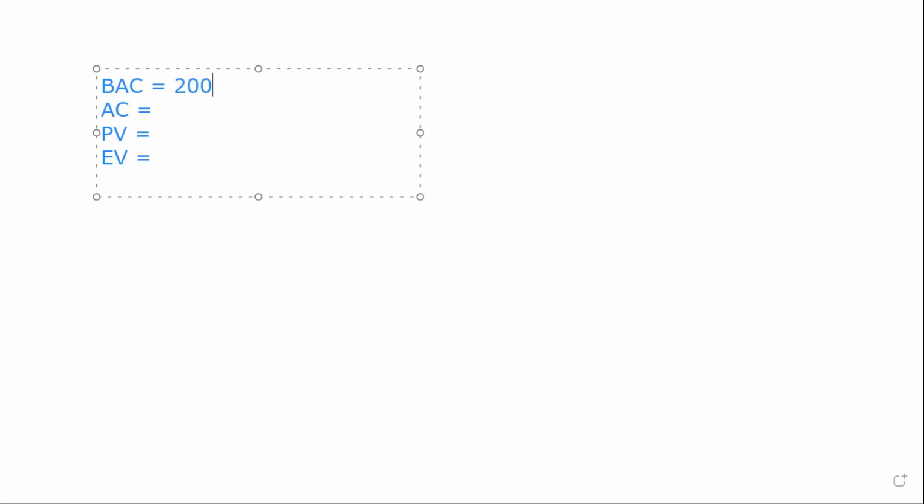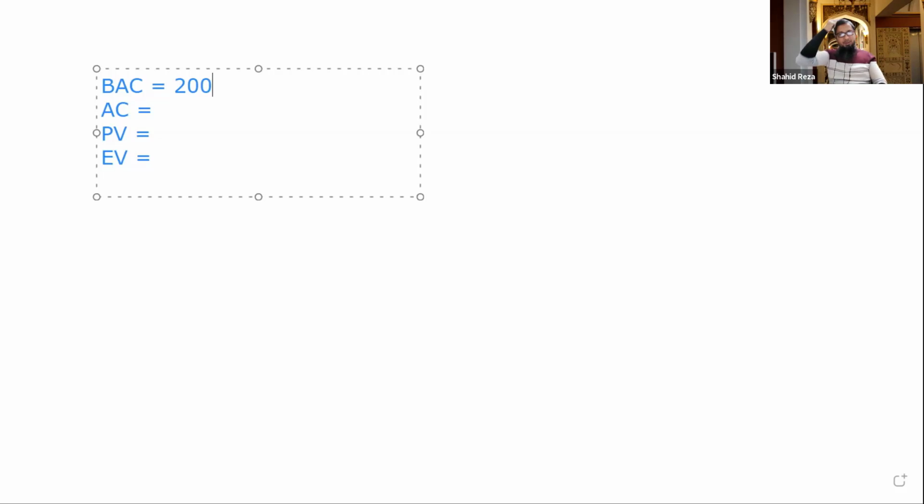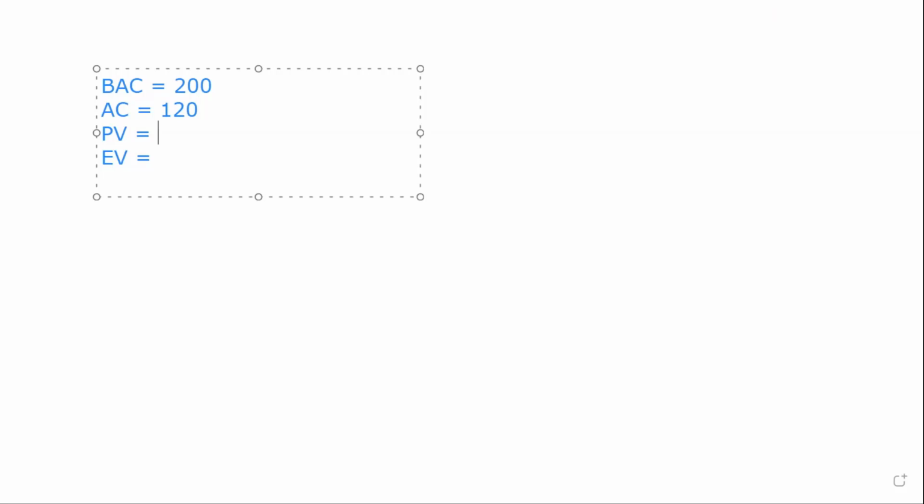এটা আমার সাথে একটু কথা বলেন, না হলে বোঝা যাবে না সবাই বুঝতেছেন কিনা। হ্যাঁ, keep yourself unmuted. All right, so how much money after second day we have spent? Actual cost is that. Actually, how much money we have spent on the data date or status date. Our status date is when? After second day evening. So actual cost is $120, right? Exactly. Okay. Yeah.